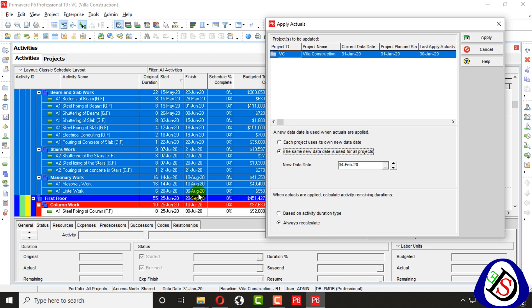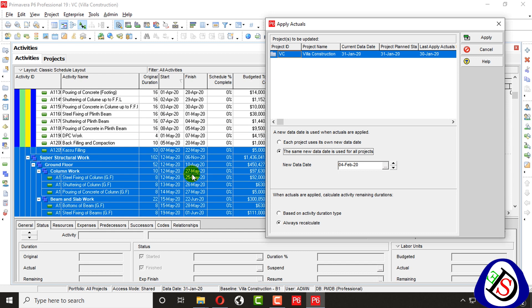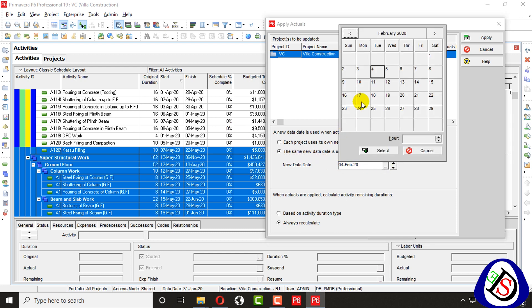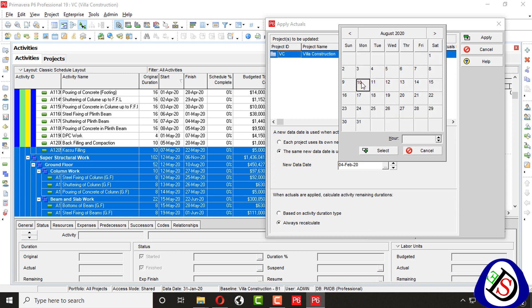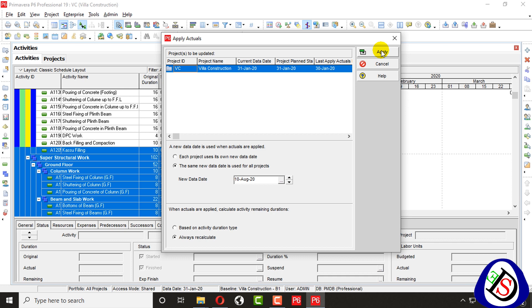I will go there and set the date. I will put here 10th of August. I will go for Apply Actuals and enter the 10th of August as the new data date.